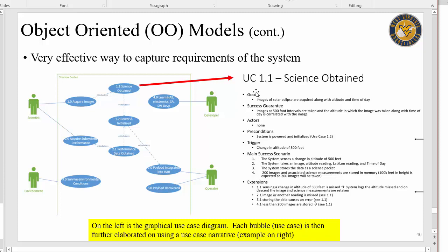Okay, the whole purpose here, again, this is the analysis phase. We're generating these so that they go into the product backlog and eventually make a sprint backlog so that it gets built. But this represents our requirements. This is what makes the backlog. This is what folks are going to implement, because they're going to pluck this out of the backlog and say, I'm going to work on it. Okay, let's see. Do I understand everything that's in here? I need to design a solution for it. I need to write the code for it. I need to test it. And then boom, that's going to be a shippable product in 30 days.